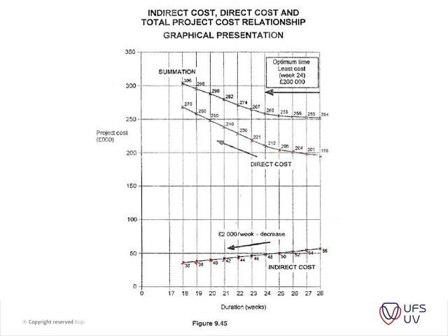And then we can see here it starts to jump from 212,000 to 221,000. Okay, and then going up, just adding this one to that one, we can see that we've got a slight jump here, and then here's that 7,000 jump that we highlighted in the previous table, which means that our optimum point of time and least cost is at week 24.